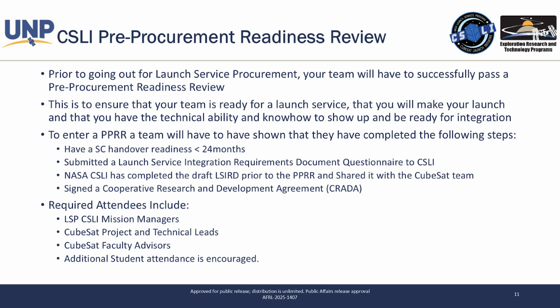The one thing here is just to hit it once again: a PPRR is just there to make sure that you are ready for launch, that you have the technical ability and the know-how to show up and be ready for integration. Have a launch service readiness of less than 24 months. You have to have submitted that questionnaire document that I referred to, and then you also have to sign that CRADA document.